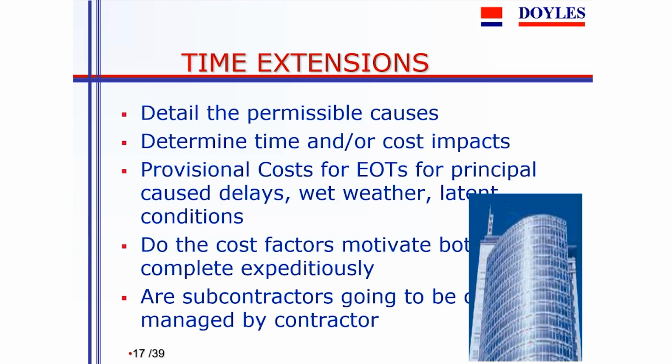And often contracts are quite limited in the causes that will entitle the contractor to extension of time, and in the view of many, that is not efficient, because it means that the contractor is under unfair pressure to get the job done despite what delays he has, and that causes knock-on effects of misestimating various aspects and trying to rush through jobs in a quick time.